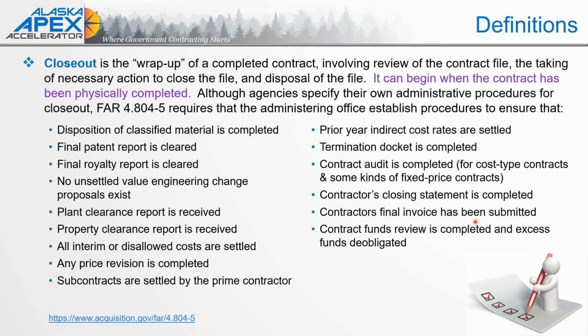So be careful of that when you are submitting those invoices on that electronic process, that you are paying attention to whether it truly is a final invoice or not when you are submitting that, especially if you have a contract where you have progress payment options.